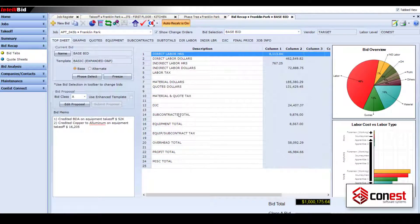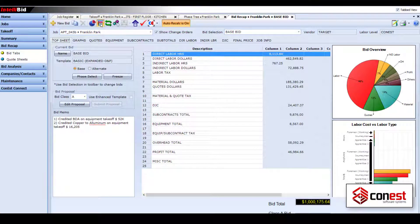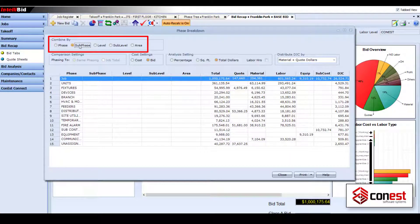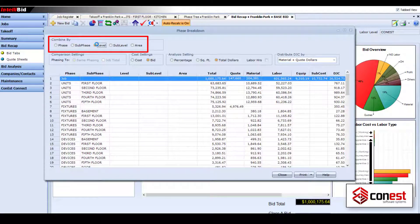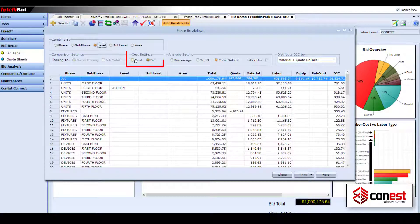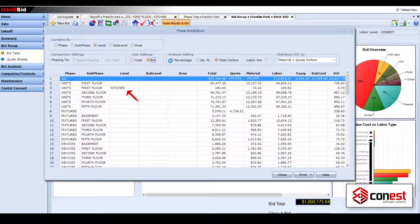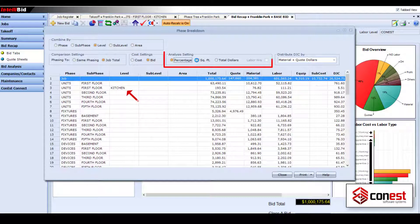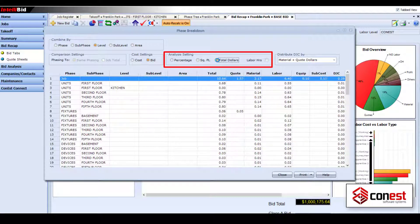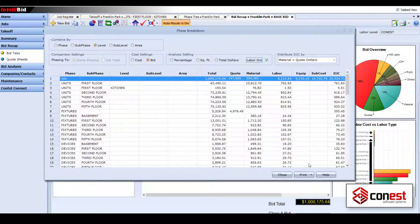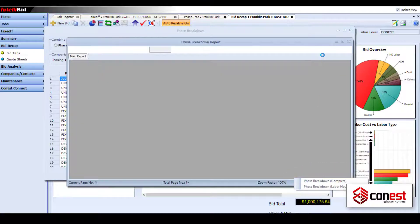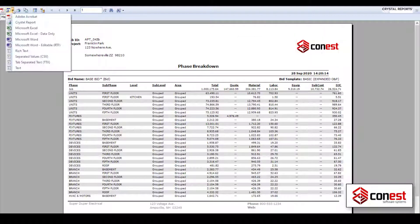Once you've completed your takeoff, you can use the phase breakdown in Bid Recap to analyze your bid. See your bid broken down by top-level phases or five levels deep of sub-phases. Break it down by bid price or cost and even compare by percentage of job, square feet, or labor hours. And of course, you can run the phase breakdown report to get a printout, PDF, or Excel version of the breakdown.